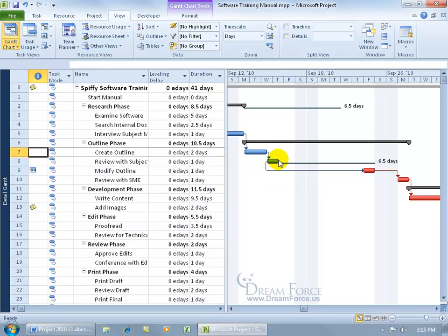So if you add it up, this one finishes on Tuesday before it becomes critical, because we've got 1, 2, 3 days, and that's what we've got here. 2 plus 1 is 3. So you take into account that after these tasks, or that phase finishes on the 21st, you add 3 days, it hits the 24th, which when you hover over that, it says free slack until the 24th.